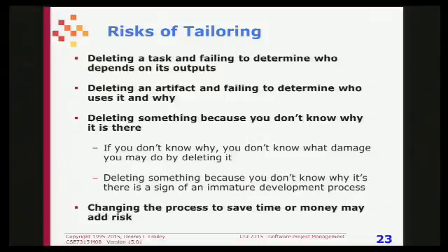Well, you're pretty sure there's a reason why those belong in the toy, and it's probably not going to work right, right? Well, when you tailor a process, you need to know why everything is there so that if you decide to take something out, you know why you don't need it. Sometimes you take something out because you can't understand why it's needed, and then somebody else needs it and you didn't produce it. You have to make sure you know why it's there before you take it out.